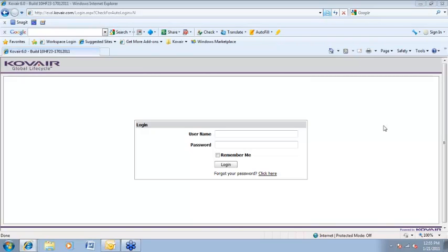Now, typically, a third-party integration tool will take somewhere between 4 and 8 man-weeks to develop. But the more complicated, and when I say more complicated, I refer to tools that generally have less documentation, can take up to 12 man-weeks. But in any event, if there's a way of talking to that tool, Kovair will supply an XML exchange to that tool, and so we can integrate.